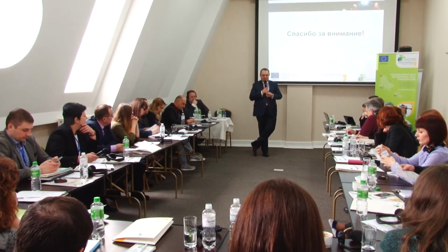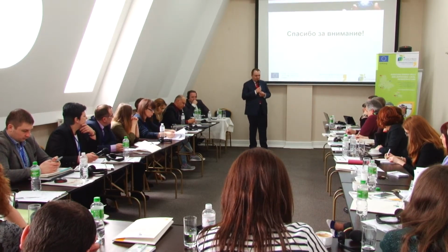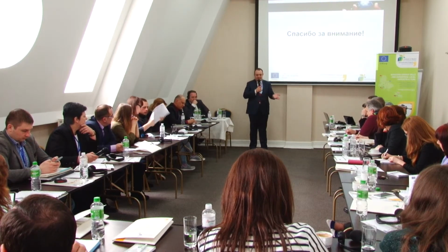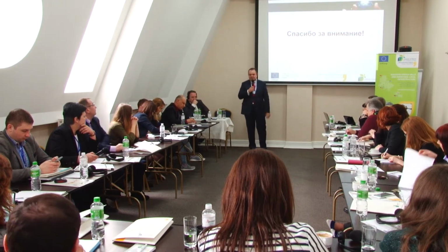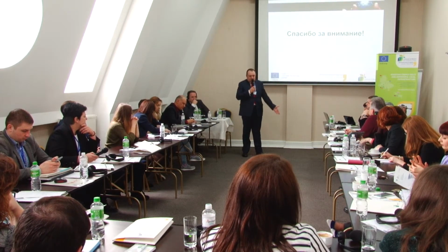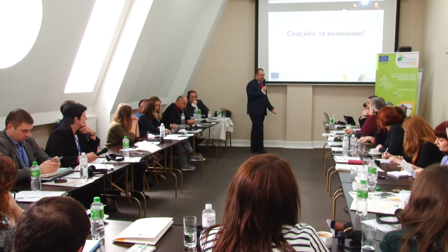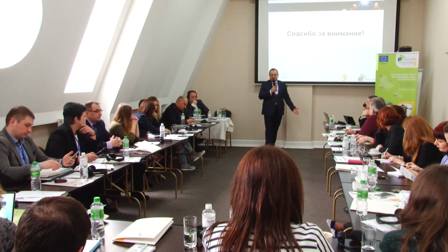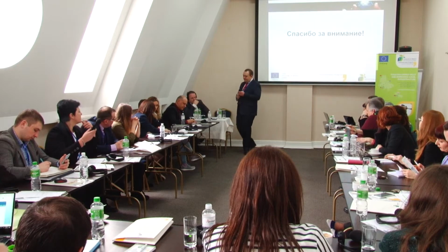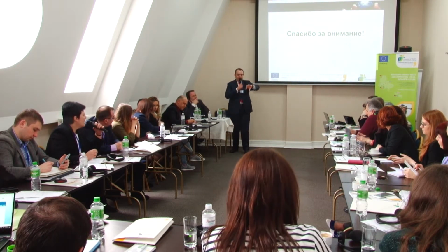So probably it's better to do this report before the energy audit, because if you have such a negative report on the building condition, it means no project, and the energy audit, if you have already done it, will be not necessary. It means you have spent your money in vain because you cannot do thermal refurbishment in this particular building.